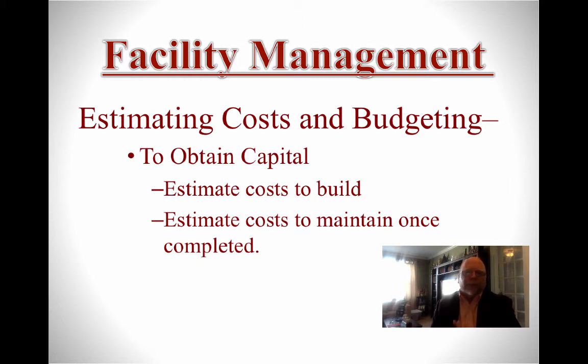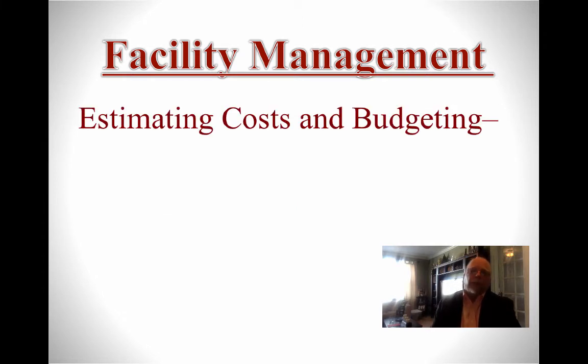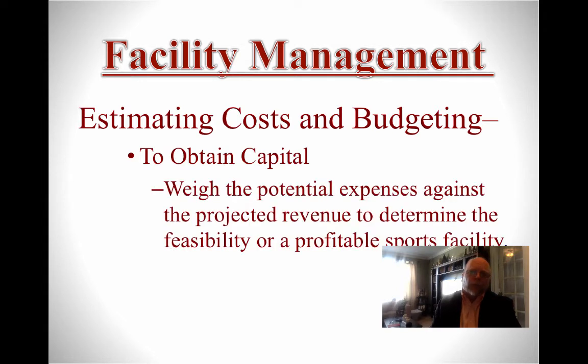So you obtain capital, you're going to have to estimate the cost of the building, estimate what it's going to cost to maintain once completed, and then you're going to determine whether these potential expenses, the cost of the build and the cost to maintain, are going to be worth it based on a projected revenue. All right, so if the projected revenue is going to outweigh these expenses, then great, then your project is feasible. If it's not, then you may have to rethink. You also, if the revenue is not going to outweigh the expenses, you're probably not going to be able to get a loan or write bonds for it.